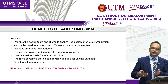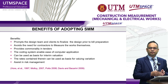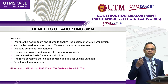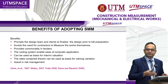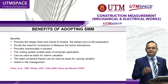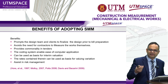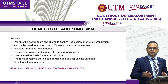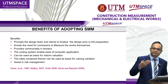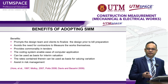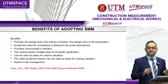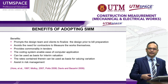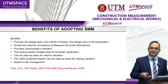We can link the BQ with BIM or any computer-aided estimating system that can produce quantities, rates, and assist in the tendering process. For the contractor and design team, the BQ can also be used as a basis for interim evaluation. This is important during the construction stage when submitting interim claims — using the BQ makes it easy to trace the physical progress of mechanical and electrical engineering services and prepare claims systematically.